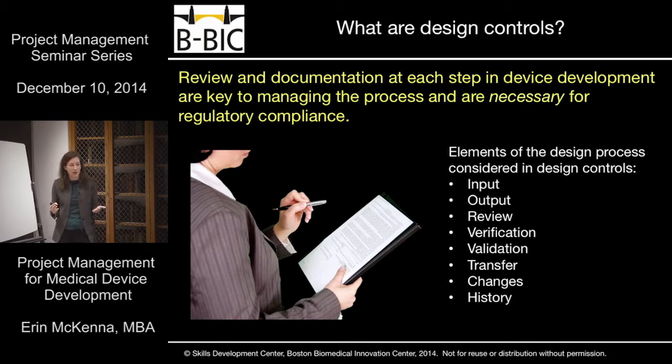design changes, which would typically occur once you've hit a point that you actually have a documented design and you need to change it. You have to capture how you're changing it, why, what the justification behind the changes is, and how it affects your product. Potentially, if you have something commercialized, what are you going to do? Are you going to pull that product back? Are you acceptable leaving it out on the market?